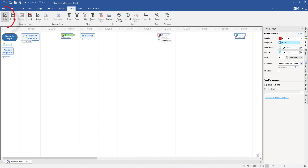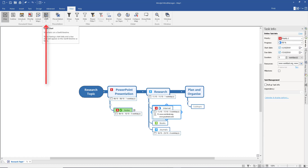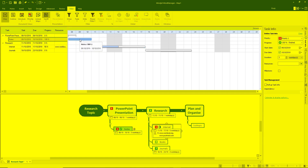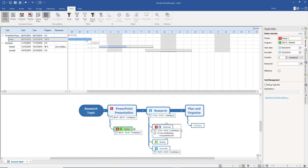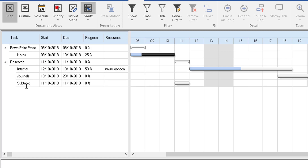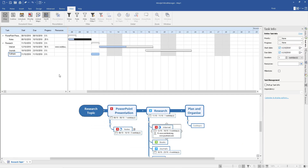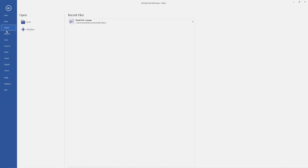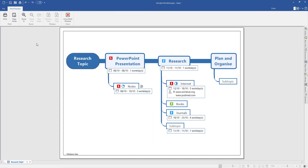I'll go back to View and back to Map, then use the Gantt Chart option. Select it on your Research Topic and the top shows a map alongside a project view with dates. If you need to adjust, hold the left button and drag the bars along. In the field in the middle, if you've only finished 25%, it only fills 25% of the bar. In Gantt chart mode you can right-click and select new subtopics — I've got Internet and Journals as subtopics. Notice Books isn't showing in the Gantt chart because I added no task information to it — you need to add that information for it to appear.